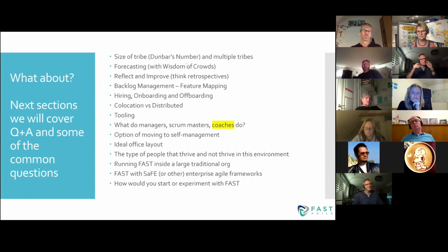And if you get to the end of an Agile project and you map back to stories, to epics, to features, it looks like a tree. So the thing is, we're letting the tree grow organically, and we do it just enough, just in time. And this is how we do it. So I'm not breaking down that entire feature. I'm breaking down enough until I've got work for my team to do in the next 2 days. And I keep breaking it down.